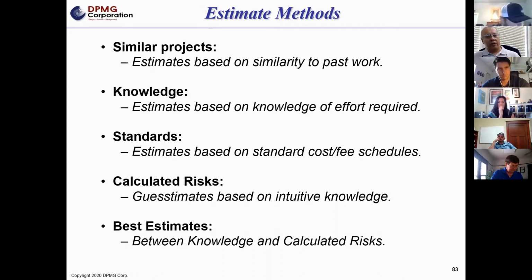You start with, this is our standard method for installing or assembling pipes, or on the electrical side, for installing, let's say, wall outlets. This is the standard, and that becomes the standard labor unit and a cost associated with that labor unit that you can then use to estimate a project or estimate a job. And then you can compare. So to answer your question, no, not everyone has that. Actually, I would say most people don't have it.